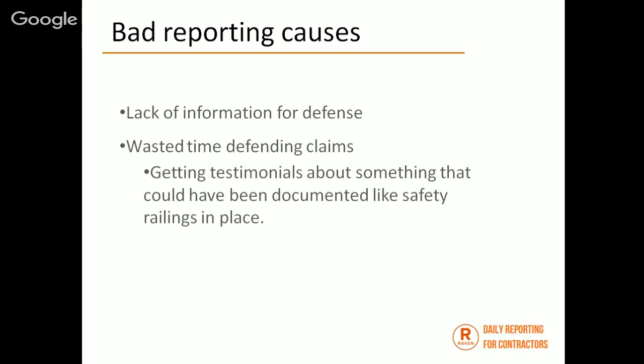Right. And if we don't have a good defense, right? So think about it. We talked about the guy claiming to get hurt. If you had to go around now and take testimonials on your project site of people, 2 months later, asking people were the safety railings, for instance, always in place on the project? Think of all the time that it would take to do all that, where if you had a report that showed a checklist that safety railings were in place or checked every day, maybe you don't have to do quite as much work and you've got a good defense. And again, wasted time is lost revenue.